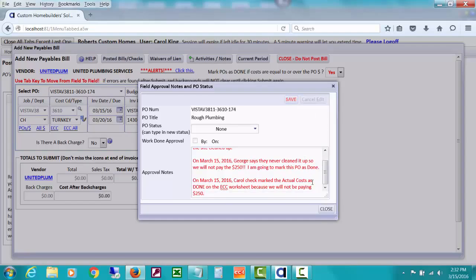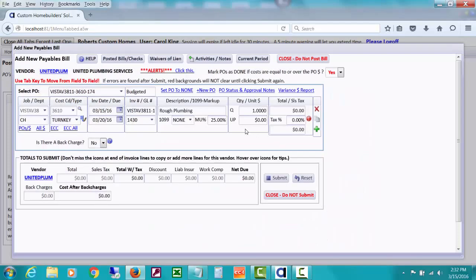So you can see how the bookkeeper could actually get a clue, not post that bill for $250, or could post the bill and then put a minus line that indicates we're deducting, so that it's clearer if you ever look at everything. It's just a little bit up to you. You might decide that this is enough notes, and not post the bill at all. Or you might make something in your trail that does a plus and minus. So if I went ahead and put 250 here, and then I just copied my line,